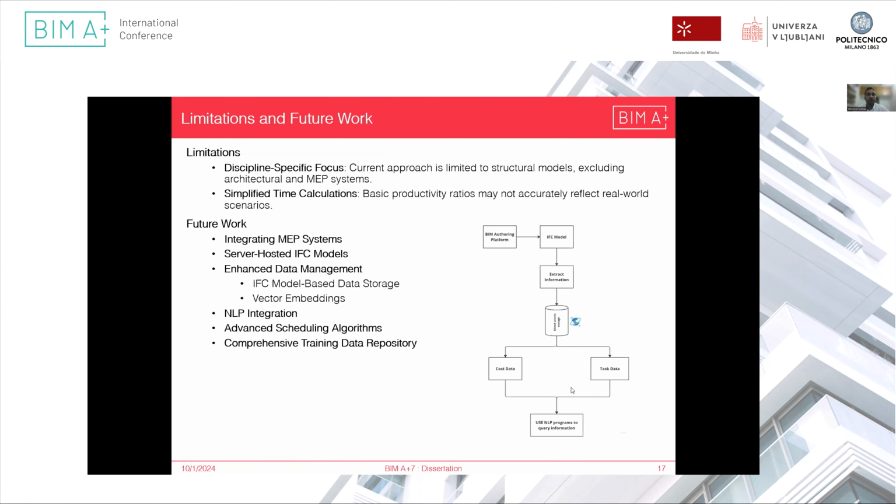Now we talk about the limitation and the future work. The main limitation is that it is discipline specific in focus. We have just taken the structural model into consideration. We haven't gone into the architectural and MEP variabilities. Also, the time calculations for the task were done on basic productivity ratios, which may not reflect real world scenarios, and more intelligent algorithms are needed for the calculation of time.